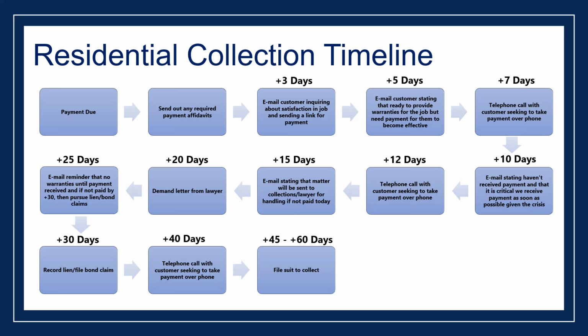From 12 to 25 days, and I'm not going to read through all of it, but basically the idea is that you keep being a squeaky wheel. Okay, you want to make sure that you get paid. At 20 days, that nasty gram from the lawyer comes out. I call it the pay up or die letter. Oftentimes, if people see an attorney letter, they get nervous, and that helps you get paid.